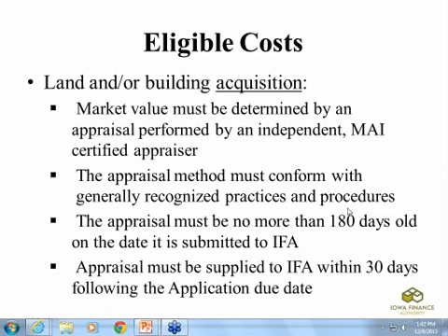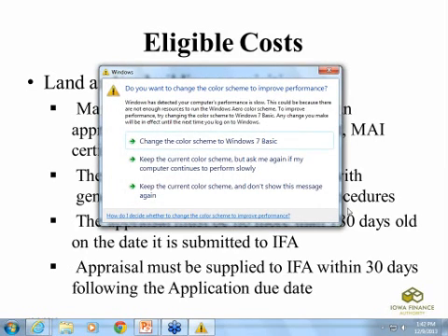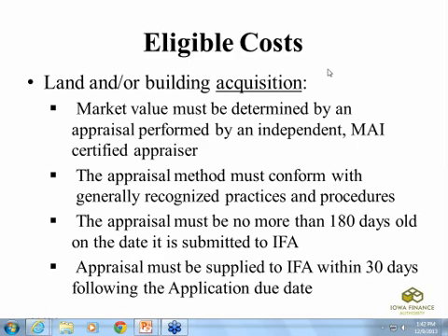Prior to the completion of the project, you will have to provide an appraisal with the as-completed value of the land and improvements. Some people choose to forego the cost of that ahead of time. It's not the preferred method, but one we can work with. Some will wait until the project is near completion before they have that as-completed value. We prefer it ahead of time if at all possible. Appraisal costs, as a side note, are eligible project costs should you receive an award.